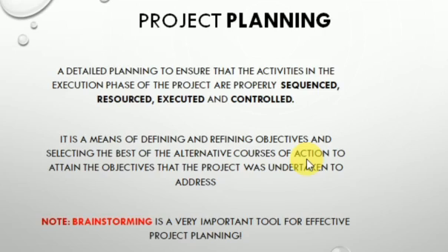This is day 3, the project process, where we discussed the initiation phase. Inside the initiation phase, you identify the problem, you build your business case, you do your feasibility study, then you set up your project management office, and then you end that phase with the terms of reference, which is the project charter. Once you prepare the project charter, that phase is closed. You perform your phase review, you close that phase, and then you move on to the project planning phase or process.